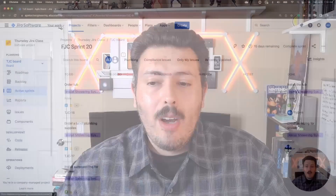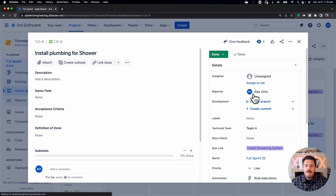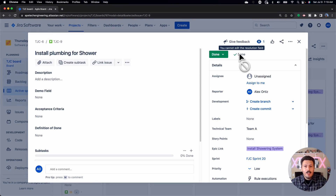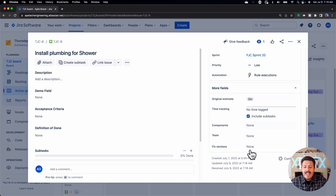Any issue that isn't crossed out is basically unresolved. You can confirm that an issue is resolved by opening and clicking on that issue. You'll see two things: a check mark that says it's done, and most importantly, a section that says 'Resolved' with a date timestamp on it.